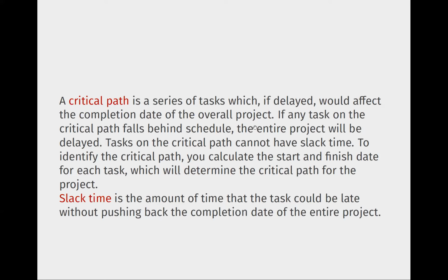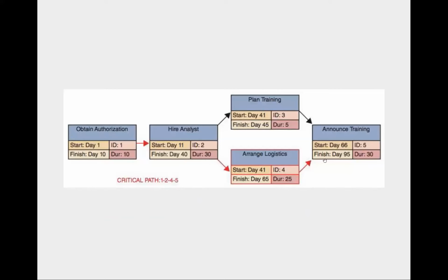Now, in the problem here, my question is, this is in the critical path. None of these tasks you can delay. So no slack time for any of these tasks, right? So let me make it clear to you that there is no slack time for any of these tasks. No slack time.